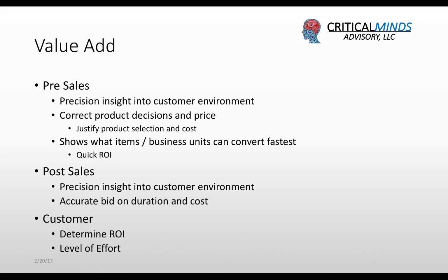get those into production. From a stakeholder perspective, an implementation team, what you want to see is you want to get that go live. You want to get that first go live to get the adoption, get this moving forward. And then while that's happening, you could be working on the harder folders or the folders that require a bit more attention, and space those out. So you're not just randomly picking jobs and then realizing that it's going to be more complicated.